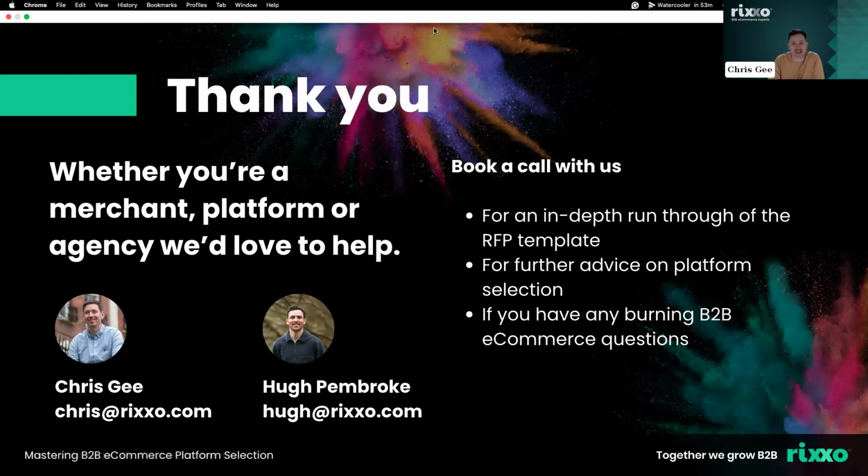It is a complex process, and you could be opening up a can of worms if you go after it without a plan. And I'll jump in there as well, Henry, we spoke about getting a project charter together. That might be your starting point in terms of trying to get internal buy-in and using that to manage up about why the e-commerce RFP platform selection is really important, to get that additional resource or to get that sign-off. But having that documented exec summary project charter, for instance, about the vision of where you need to go is a super important stakeholder management piece to get that buy-in and for people in your business to understand the why of why you need to go down this path.